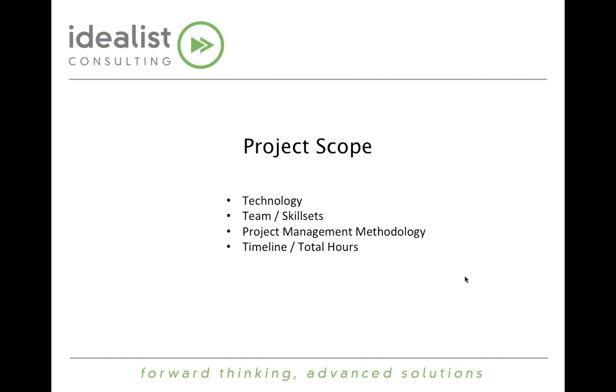and that is that the client should expect to be heavily engaged in the testing and the user acceptance testing. Mobile apps really need to be tested in the field by the users who are going to understand the business processes. As consultants, we can design and we can test and we can build to your specs, but we really don't know how it's going to function in the field until you get your users' hands on it, and that's where we really see where the rubber meets the road.